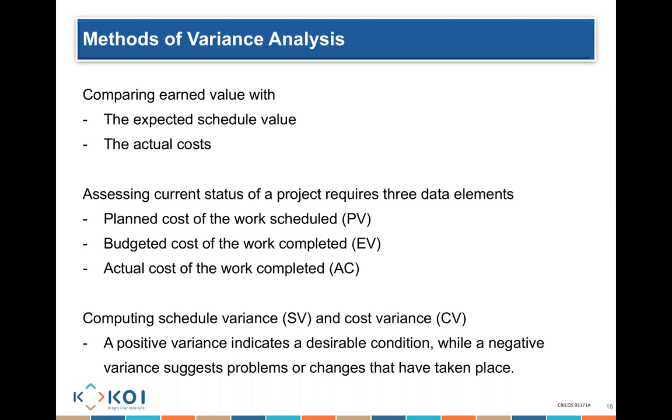From there, it's all about looking at my schedule variances and cost variances. If I have a positive variance, sweet. It means either I am ahead of schedule or I am under budget. If it's negative, however, I am behind schedule and over budget. And that's really where it becomes a problem we need to deal with and solve very quickly to avoid negative consequences for my project.